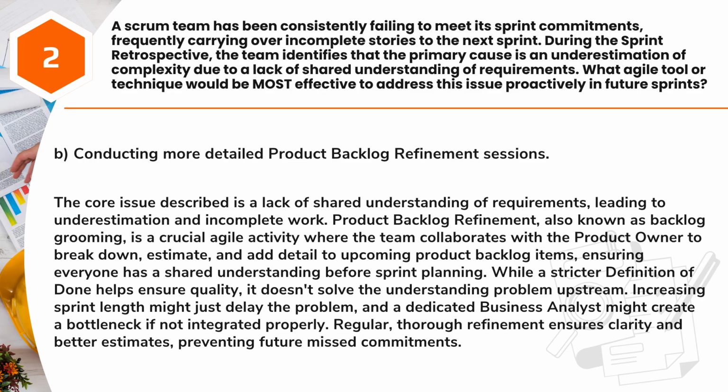The core issue described is a lack of shared understanding of requirements, leading to underestimation and incomplete work. Product backlog refinement, also known as backlog grooming, is a crucial Agile activity where the team collaborates with the product owner to break down, estimate, and add detail to upcoming product backlog items, ensuring everyone has a shared understanding before sprint planning. While a stricter definition of done helps ensure quality, it doesn't solve the understanding problem upstream.